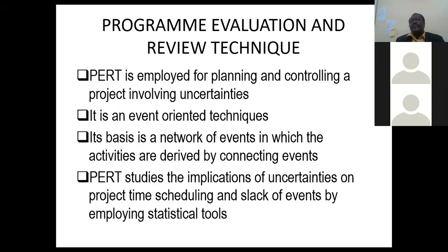Now, PERT is employed for planning and controlling projects involving uncertainty. It is an event-oriented technique. Its basis is a network of events, where activities are derived from connecting events. PERT studies the implication of uncertainties. That is the good thing.